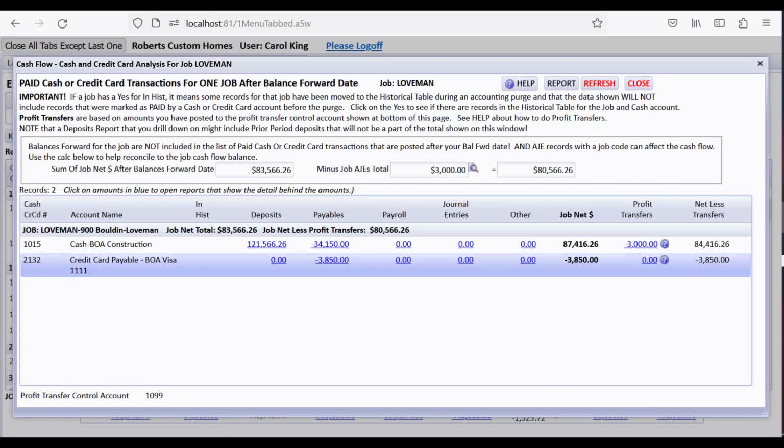card. And when you post a job cost bill, you might mark it as paid by credit card and select which credit card account. You can run ledgers of these, see everything for the job that was paid on a credit card. And so it's here as part of figuring out how much cash there is for this job, because you will be paying the credit card at some point, even if it's a big lump sum. But as you post it, it's captured by the jobs. This would take a lot of doing to present something like this on a spreadsheet, but CHS will do it